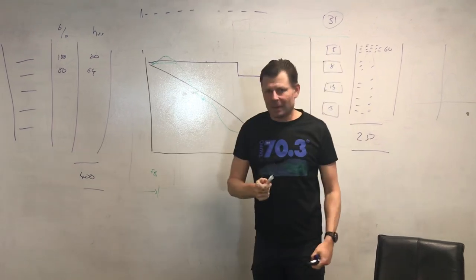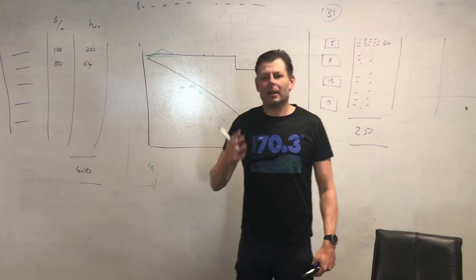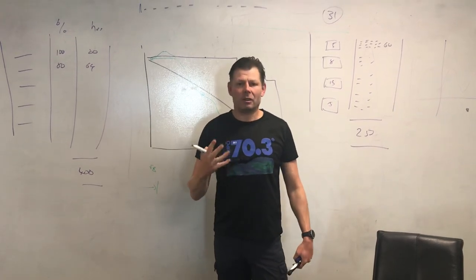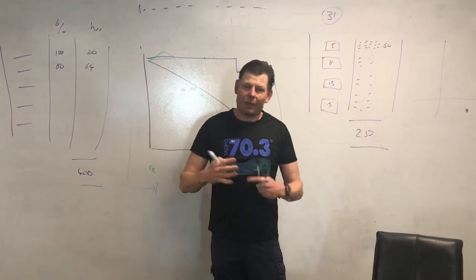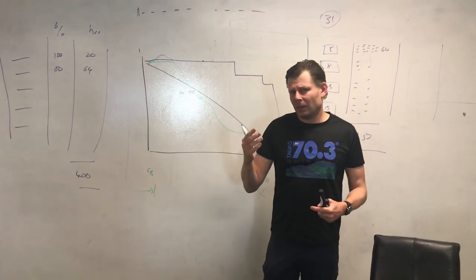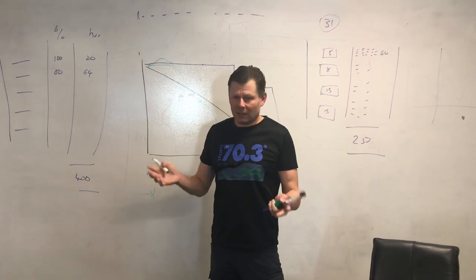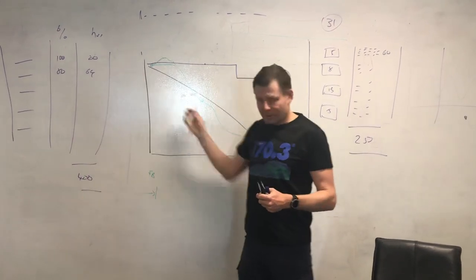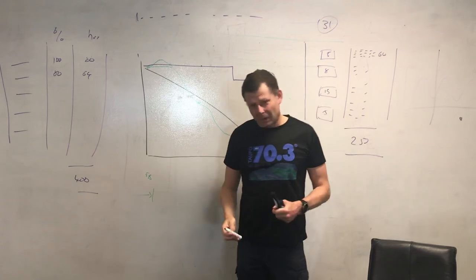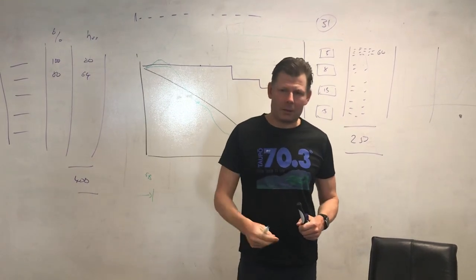So what I recommend is we can use two techniques. One is just to simply count the number of tasks, the number of post-it notes on your physical board. On average, they'll be about the same size, half a day to a day, maybe a day and a half. So you could say for a team of six, probably, I don't know, 60 tickets at the start, and you can see how it progresses down. That works really well, actually, with some teams, but I prefer to go one step further.